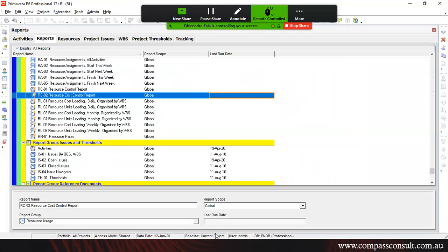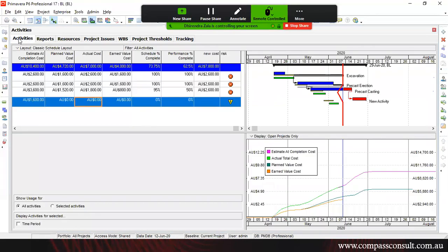The project controllers will have all the controls. The project manager will have only information on project performance. The person who is going to enter the data from the field, like the support staff, will have access to only those parts. The contract manager will have access only to claims from Primavera, so he won't have access to other features.